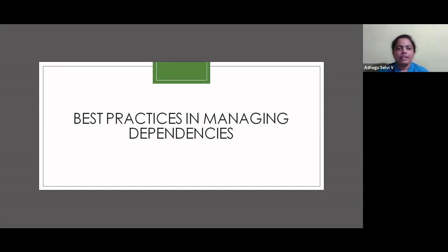For example, if I'm telling my product owner at the end of the daily stand-up that I just got confirmation from the design team that they are blocked with other priority work and may not be able to give the design, I can ask why can't you pick up some other items for refinement? In a way, it is also giving a heads up to the product owner that the items he or she has planned may not be candidates for the next refinement session, because the design part is not yet ready. In other words, the team has completed the estimation without even the design available.